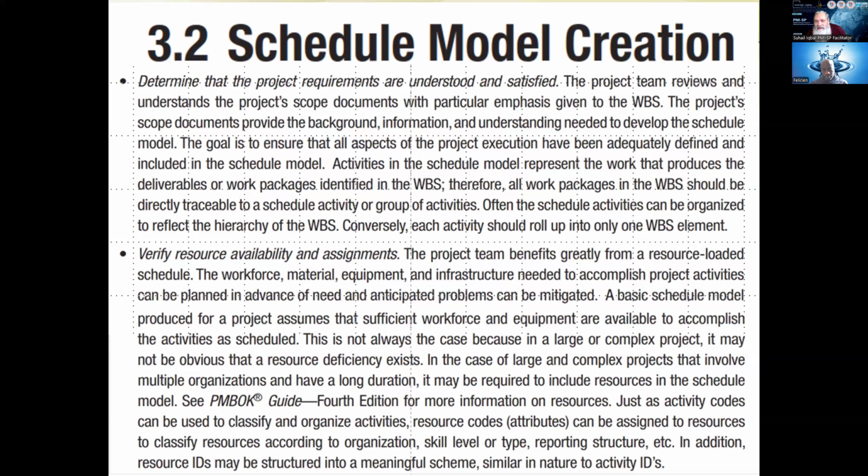So those activity codes must be allocated, which could facilitate your numbering system and your organization. They can even allocate a resource code in addition to that. For example, there is a skillful worker, a carpenter, so they may give him a code C for carpenter, and this is number 0001, and then another carpenter is C0002 or something like that.